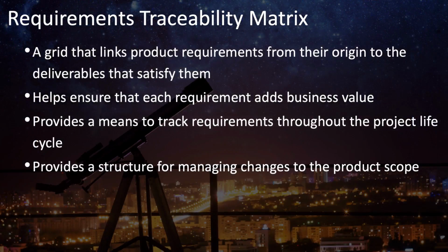The idea behind the requirements traceability matrix is that it links or connects each project requirement from beginning to end. It links it to those business requirements or needs that were identified initially in the project, in the needs assessment. It connects them through the project charter and connects all of the work that's done throughout the project to implement that requirement and develop the features or results and deliverables that the project is meant to deliver.